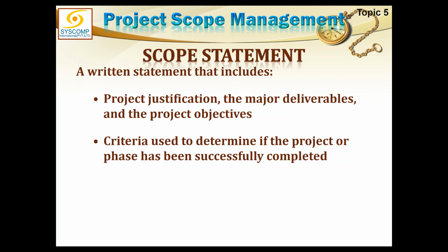So he will carry out his own analysis, and he will dig down into things a little deeper, and he will provide his own justification for the project, whether it can be done or not. This is the time when the project manager can say this cannot be done and I am unable to do it. So therefore this should not be done. But if the project manager goes through this phase of developing the scope statement, and that scope statement is approved, then the project manager has no way to turn back and say it was an undoable project, but I just agreed with you.